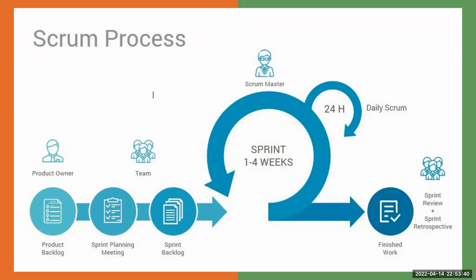I don't show up as the client at daily Scrum. That's not the point. The point is a 15-minute standing meeting where you discuss what you did yesterday, what you're going to do today, and what are the impediments. The only thing the Scrum Master does is make sure that meeting happens. They don't have to be there. Yeah, great question. Any other questions on that?